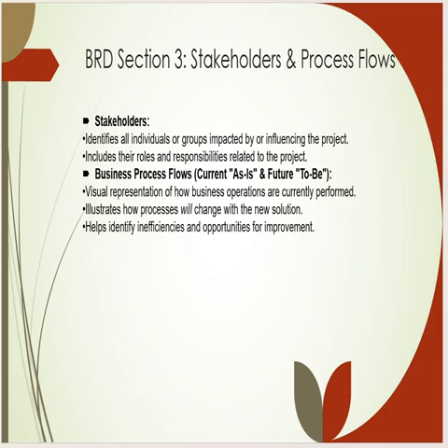Then the next topic is the business process flow. In that business process flow, we should cover the gap analysis in detail. In gap analysis, we consider the current, meaning the as-is process, and the future, meaning the to-be process: what the process should look like after implementing the business requirement or the functional requirement in the system. So that part we should cover in the business process flow.